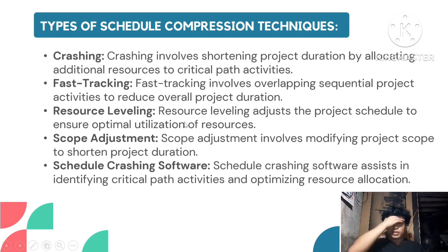Resource leveling. Resource leveling adjusts the project schedule to ensure optimal utilization of resources, ensuring consistent workload and preventing resource over-allocation. Scope adjustment. Scope adjustment involves modifying the project to shorten project duration by removing non-essential tasks or features.